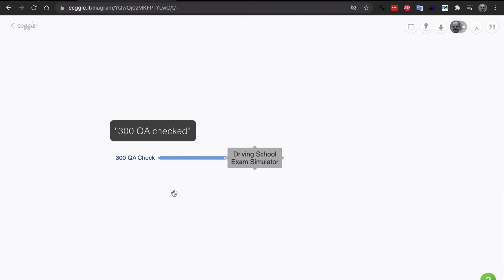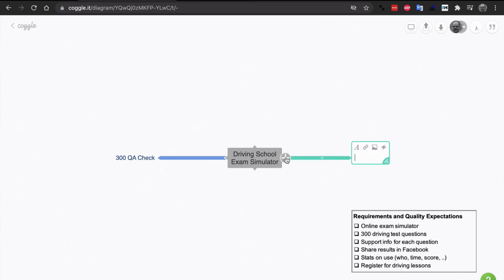So what's the next thing that I would do? Well, probably to look at the different theme. There's a WordPress theme that we can use. I could write down select WordPress theme, but after that it would be WordPress theme selected. All right, then what would happen next? Maybe I would configure the WordPress theme. That would be good.